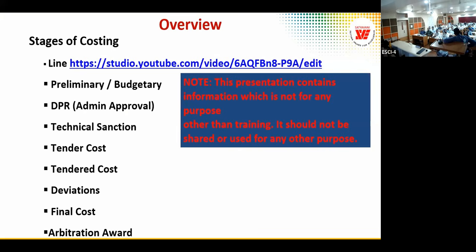And he agreed, not on paper. The secretary agreed that if financial concurrence, FC, is required, he will give it. Because we said if we put it at 600 crores, I have to go for FC, because there is a 40%, 50% variation in the cost when the contractor quotes, which we know very well. And we both agreed unofficially. We did that.